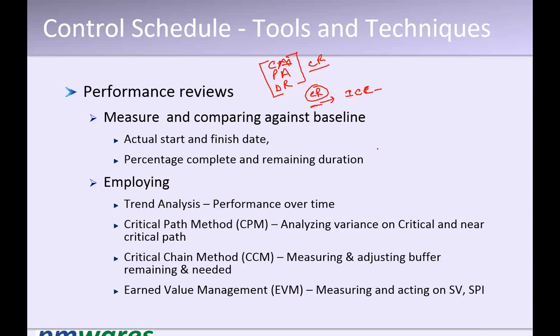Now the change request coming as an output to these processes, like every control process has an output as in change request. So this is corrective action, preventive action, and defect repair. Now corrective actions or preventive action may lead to additional work in the project as well. Can lead to a CR, which we normally term in our projects. Corrective action is not necessarily within the project scope. It can say that you have to add some scope in the project also. This is possible. Agree, but not necessarily. Correct. But not necessarily.